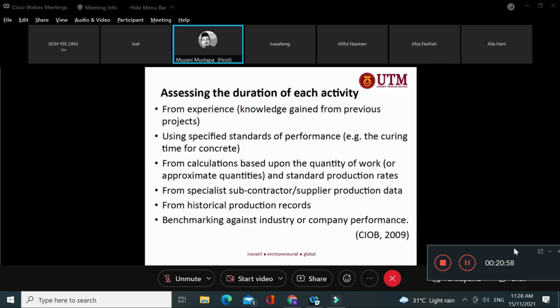Why? Because the contractor will say, okay, for a duration of 1 month, I need to add on the number of workers, I need to ask the subcontractor, the specialist, or add up workers, or get the material from outside, or take a different approach.